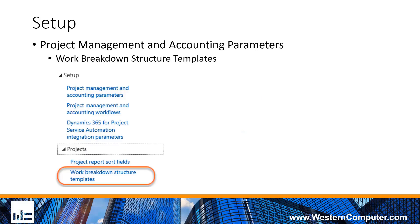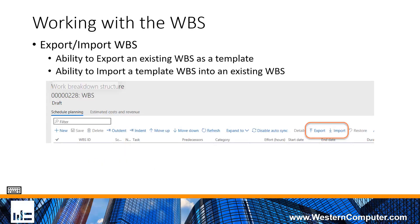From a general overview perspective, you have the ability to do some work breakdown structure templates in the system. You can create and store templates that you can then import into your work breakdown structures. When you're working inside of a work breakdown structure, you have the ability to export one that you've created and then import one from a template that is pre-existing. This helps facilitate the creation and the management of your work breakdown structures.